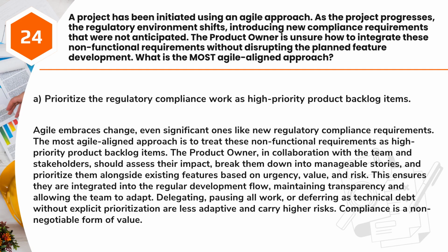Answer: A. Prioritize the regulatory compliance work as high-priority product backlog items. Agile embraces change, even significant ones like new regulatory compliance requirements. The most Agile-aligned approach is to treat these non-functional requirements as high-priority product backlog items.